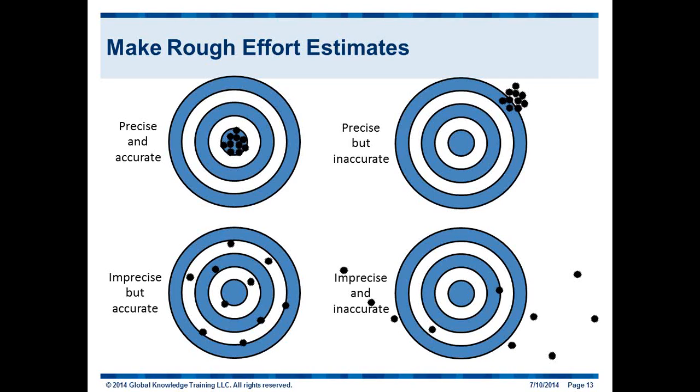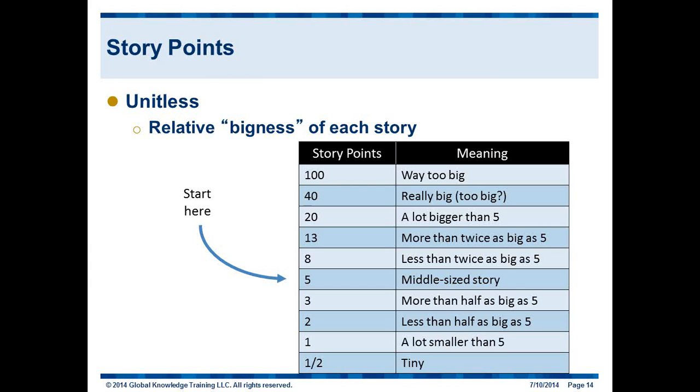In order to do that, Agile uses a specific methodology to estimate that's probably a little bit different than what you've been exposed to before. We use relative estimating using this thing called story points. And I'll be really candid, story points for me was the absolute hardest part to get used to because I want to know how many days is it, are we talking about effort, are we talking about duration, how complex it is, are we baking the risk factor into it. I was definitely one of those project managers. A story point is what is referred to as a NUT, a nebulous unit of time. It's not time, it's not effort, it's not duration.